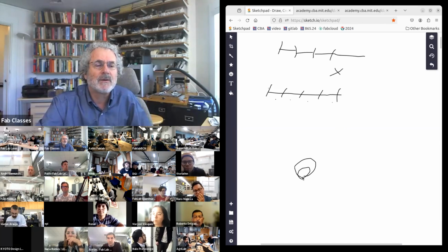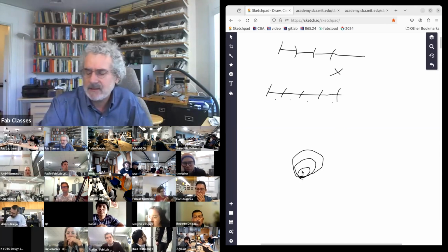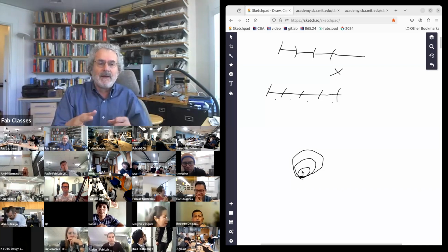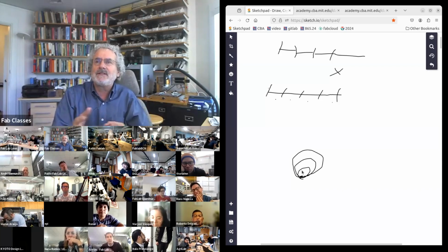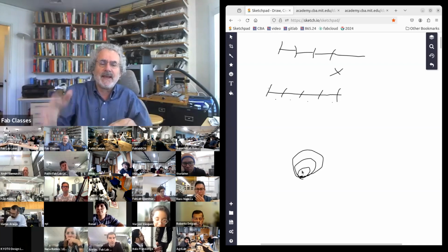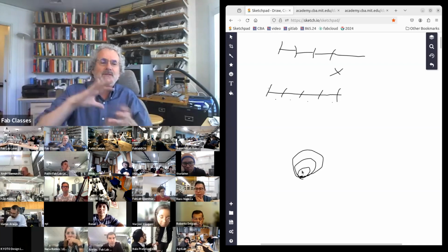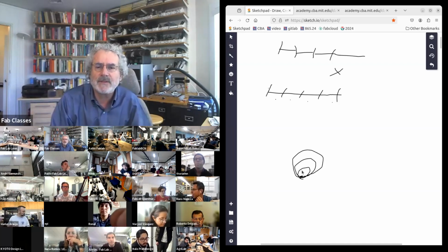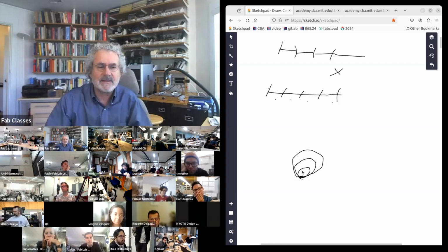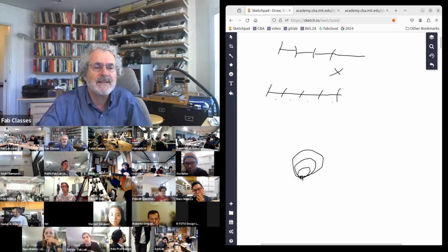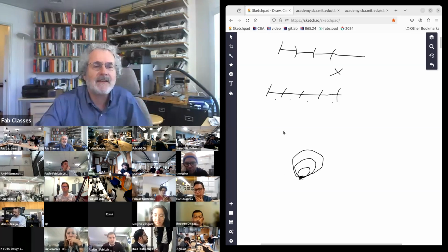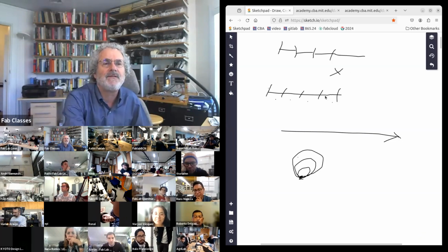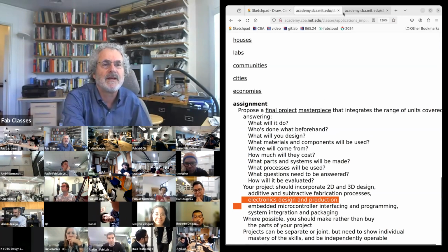In working in spirals, each spiral ends up with something testable. So we had the hand 3D scanner. The first version doesn't scan at all, but just takes pictures. A second version does take pictures for photogrammetry. A future spiral can add a laser for real-time scanning. But the key thing is you don't want to wait to test a project at the end of the development cycle. You want to keep testing and adding features as you progress.